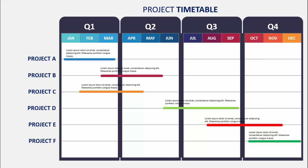In today's tutorial I'm going to show you how to create this project timeline or timetable. I have four boxes for each quarter — Quarter 1 starting from January to March, then Quarter 2, April to June, through Quarter 4, October to December. On the left side you can add the project or task details, and for each project you can add a colored line showing the timeline depending on the month, with some detailed text on top.